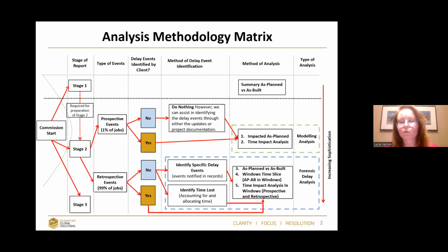Then, do we have updated reports? Which type of reports do we have as well? Do we have proper P6 updates? Sometimes we still have P3 updates, which are really outdated. So all of this I will summarize. This summary is also a part of the recommended practice. You should check which type of information you have and what is expected from your delay analysis, and based on this, you will select the proper delay analysis. That is usually stage 2 for me.